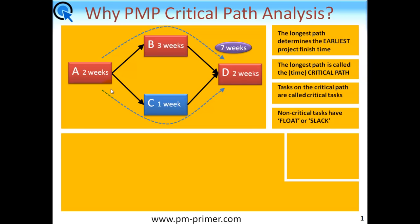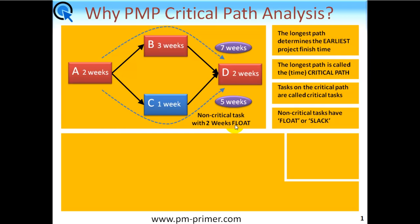In this simple example, there's another path: A, C, and D. This is clearly a shorter path — if you add these up, it comes to five weeks. Therefore, in this example, C is the only non-critical task. If you look at the difference between seven and five, it gives you two weeks. So C is a non-critical task and has, in this case, two weeks of float.